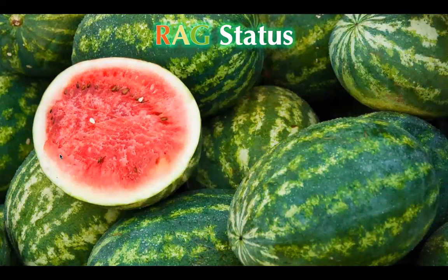So red, amber, and green, and of course, most projects are watermelons, red on the inside and green on the outside. There are lots of formal definitions of what red, amber, and green are supposed to mean, but the basics are that red requires corrective action. And as we saw last time, no one has any motivation to declare that their program or project has gone red, which results in these beautiful, large, and unhealthy fruit.